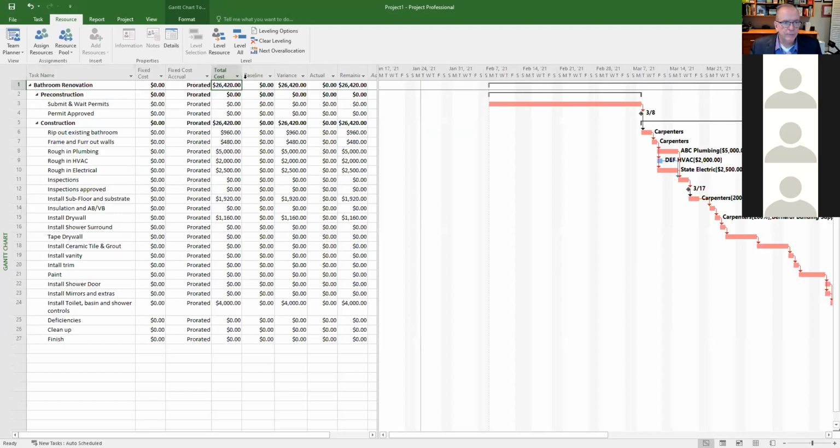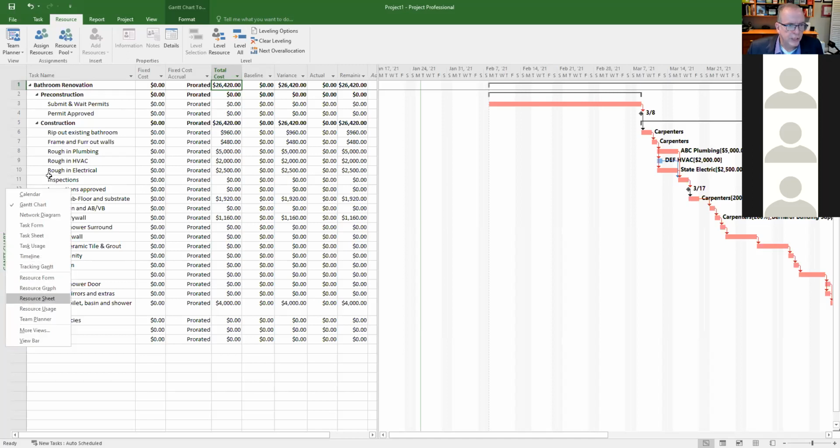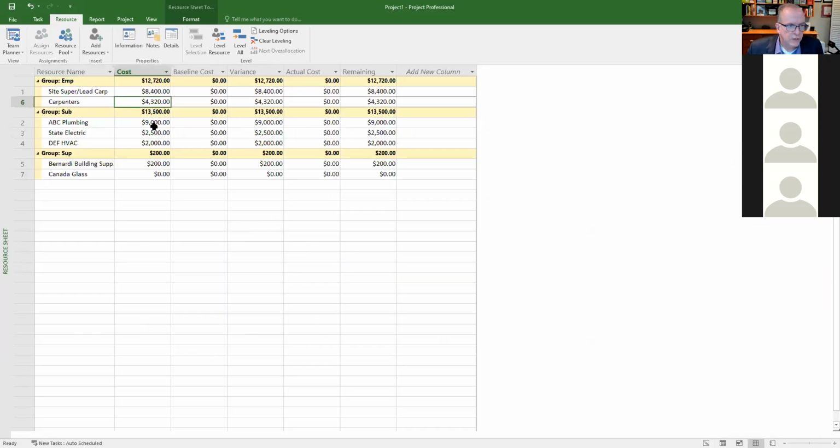And then they should add up to what my total is for the project. Right? And so if I see that there's a discrepancy, like, oh, my project budget should be 30,000, what am I missing here? I could start looking here, but I could really also go line by line at the resource sheet and just see, does this match my budget items for these? And if one is missing, then that's where my shortfall is.